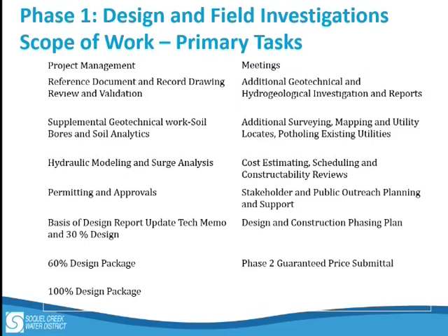Between now and then, there's going to be a lot of project management meetings. They're going to review all the existing utility drawings from along that stretch. They're going to conduct geotechnical borings. They're also going to be doing potholing throughout the alignment to verify existing utilities. They're going to conduct hydraulic modeling and surge analysis that will feed into the treatment plant design work. Along that route, and I have some additional slides, they're going to be providing cost estimates and giving the district an update as we go on the anticipated cost. They have some permits to obtain, as well as the district has to obtain some permits.